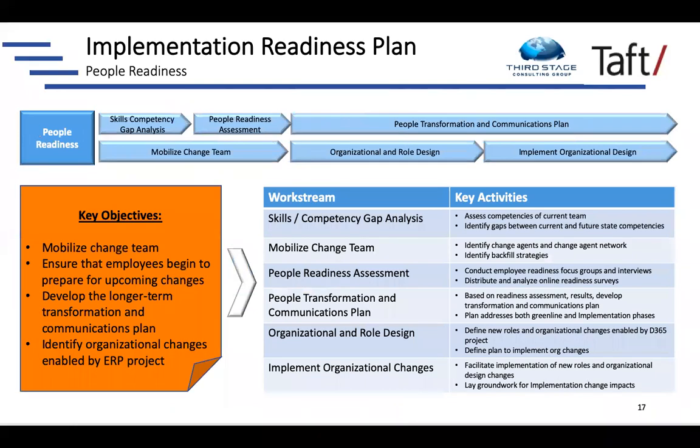So on the people readiness side, I'm going to talk a lot about this tomorrow when we get into the organizational change management component. So I won't spend a lot of time here, but suffice to say, there's a lot of prep work that should be done prior to getting too far into your implementation, where we're looking at, what is our change team going to look like, conducting an organizational readiness assessment to understand where the most resistance is going to come from, what the sources of resistance might be, and how we can start to mitigate that and put together a change plan that addresses the things identified in the assessment.